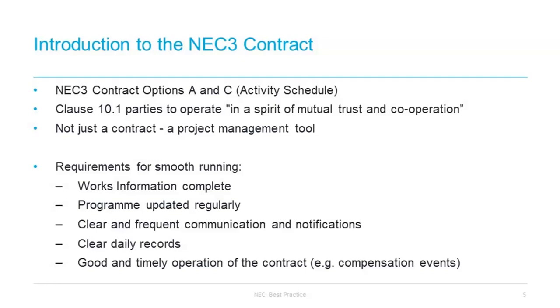To give an extremely simplified example, if an activity schedule requires the contractor to build a wall with given dimensions or characteristics, the contractor might be able to build that wall using a few different materials or techniques, whereas in a bill of quantities, typically it will tell the contractor the exact materials, equipment and techniques that they need to use to build the wall.